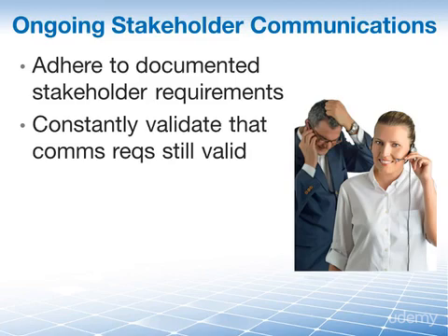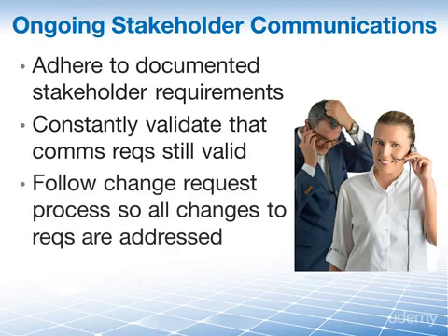And of course, as the stakeholder communication requirements change, we must ensure not only that the proper stakeholder communication documentation is updated, but also that the proper change requests are created and reviewed as part of the Perform Integrated Change Control process. This will ensure that none of these ever-changing stakeholder communication requirements will ever slip through the cracks and that all stakeholders will always be fairly represented on the project.